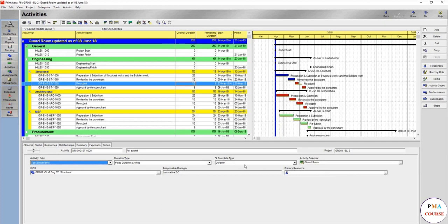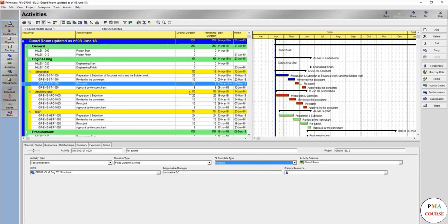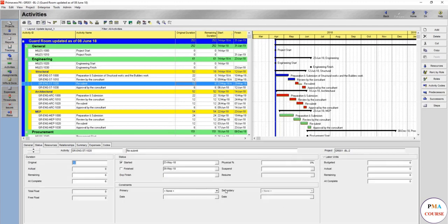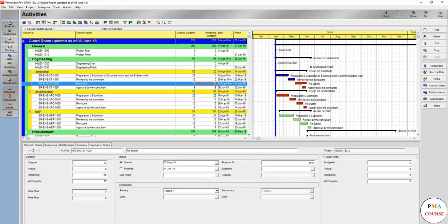In such case we have to change this one to physical. I usually prefer to work all the project in physical because this is what happens in construction especially. So now when you change, make this 50 or make this 80, this one doesn't change and you can keep this even 20. It doesn't matter.